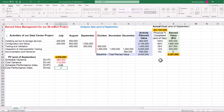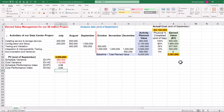Finally, we can calculate the cost performance index or CPI, which is earned value divided by actual cost. The CPI of 0.83, which is less than 1, means that the project's actual costs are higher than what was budgeted for at the end of September. This indicates that our project is spending more money than planned to achieve its objectives. This concludes the fourth step in project earned value management using Excel.